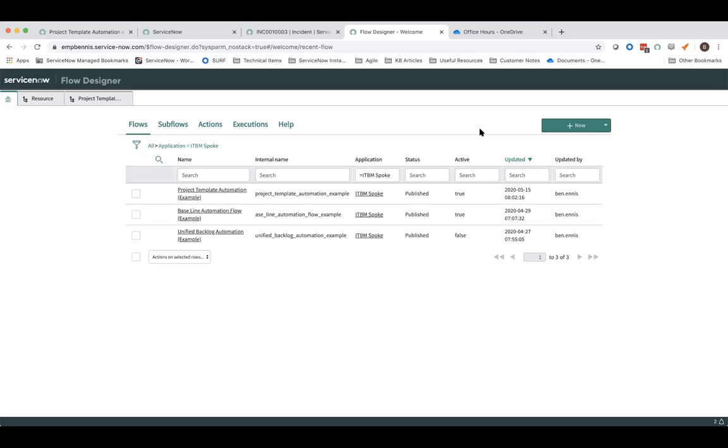And that's another real simple one. I should add that one onto this list. That one doesn't even require any fancy actions. That's just look up the record. If it's past this date, then close it out. And then there is another step to closing the resource plans. It's just one more action in that flow, which looks at the resource plan and closes those records out.